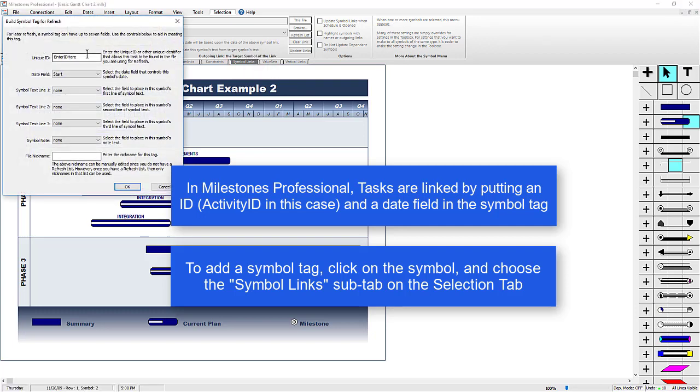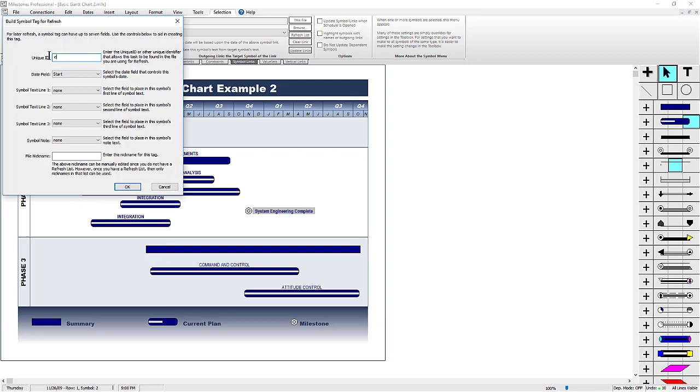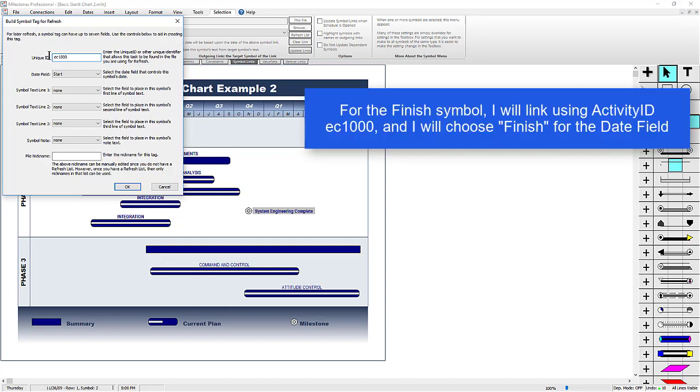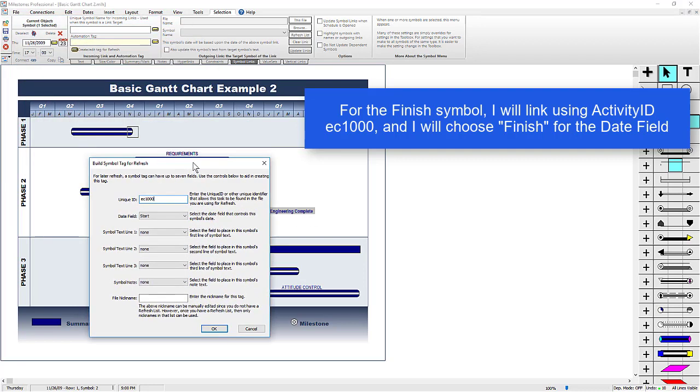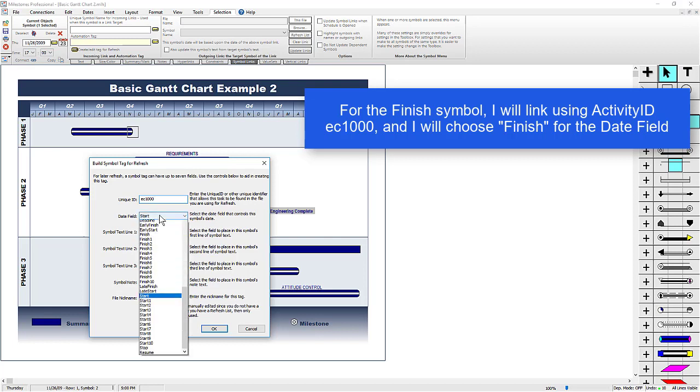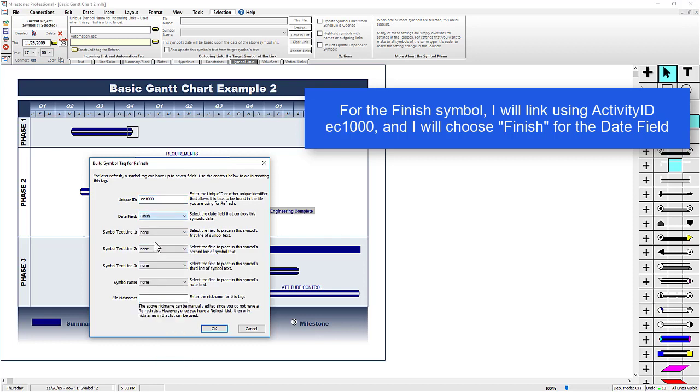Now I can put the ID that I want to link it to, in this case it's Activity ID EC1000, and then I choose which type of date field it is. So if I move this dialog box, you can see we selected the Finish symbol, so we should pick Finish for the date field. And I'm just going to change those first two options and then press OK.